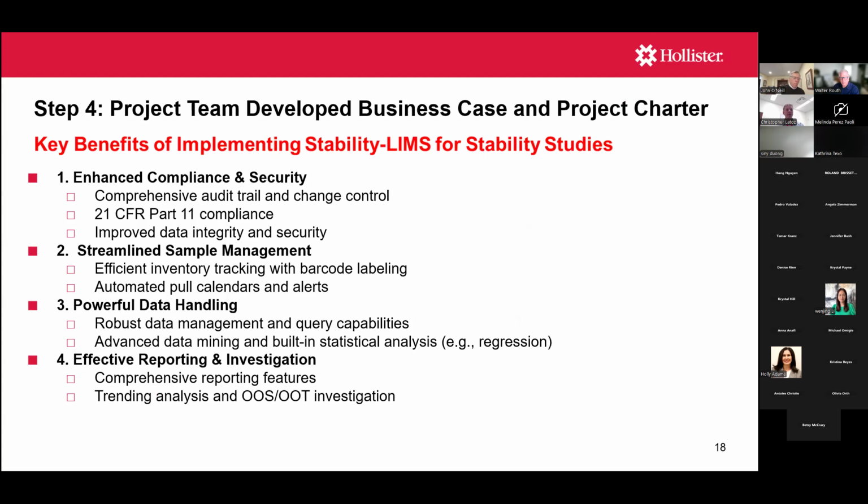So the next step after forming the project team was to develop the business case and a project charter. Again, you have executive sponsorship, so that's very important, but you still need to develop a business case. You may not have funding fully approved at this point. That's why you need a business case.